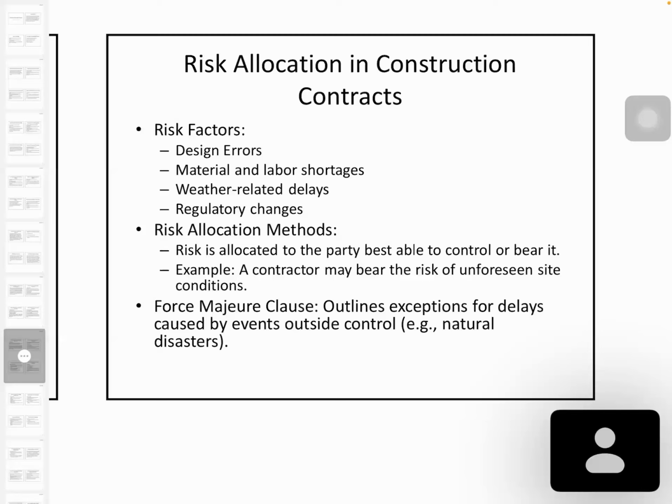So you should have a proper backup for the changes. But sometimes tax changes, those things you cannot foresee. Apartments earlier didn't have a VAT. Nowadays you have a VAT. So the client is also in a big problem because when you are planning to sell a 10 million house, because of the VAT you have to go for 11.8 million with the VAT. So his business is also not financially viable because of those regulatory changes.